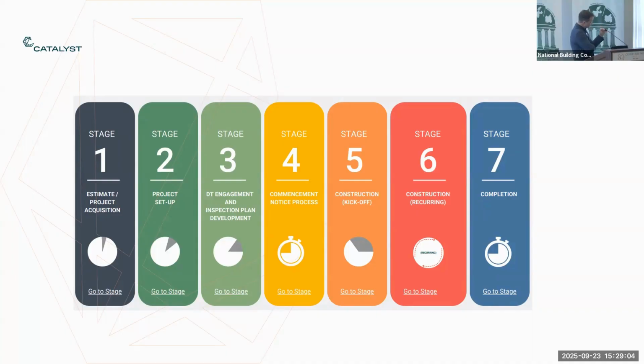After that, one of the parts of that audit is reviewing drawing titles and statuses. We've seen a lot of projects kicked back for revised information or invalidated because out of the 50 to 60 drawings or more that you would be uploading, there is a drawing within that pack that says this is issued for planning, or this is a draft, or this is issued for comments, or this is issued for tender. None of those are acceptable. They will get knocked back, and they have been knocked back on projects we've been on. So as best we can, we try and audit that, although it's not our responsibility to be auditing it.